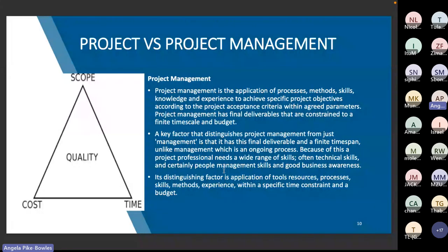You don't want to, as a project manager, save the company that's hired you maybe 50,000 Rand, but now you've used cheap material that is going to hamper the quality at the end of the day, which might actually extend your time frame if the quality is not sufficient. So it is so important to ensure that the scope, the activity that you're carrying out, follows a specific time frame, but using the correct materials, equipment and contractors that are going to still deliver a good outcome or hotel.